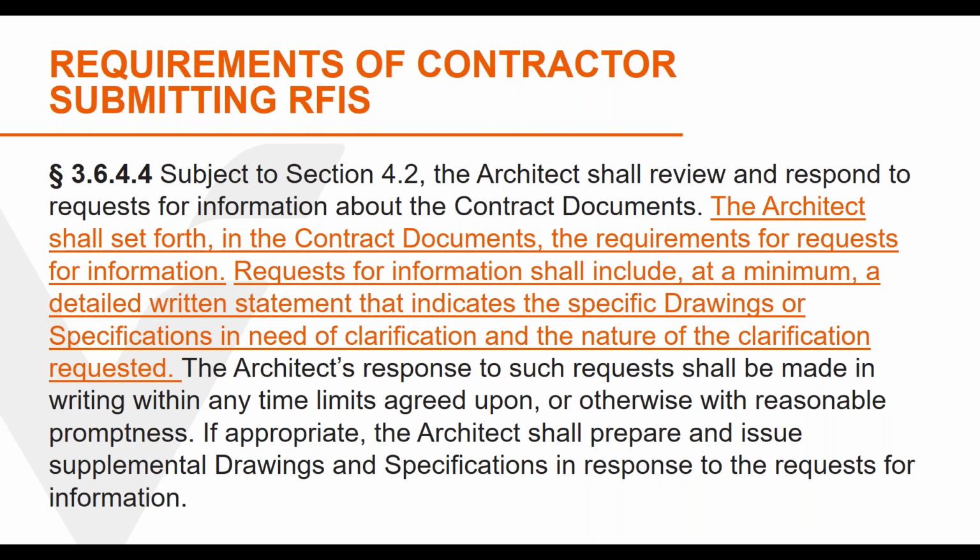You know, when the owner provides the contractor with construction documents, the owner is held to a warranty of their adequacy under the Spearman Doctrine, which was a concept created over a century ago by the Supreme Court. The contractor floods the design firm with RFIs to indicate that the design firm was negligent in its preparation of the documents, thus causing the owner to breach its warranty. As you probably have experienced, the contractor sues the owner for an increase in the contract sum and contract time, and that usually results in a negligence claim from the owner against your design firm.